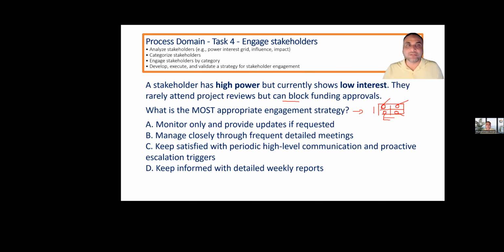A: Monitor only and provide updates if requested. B: Manage closely through frequent, detailed meetings. C: Keep satisfied with periodic high-level communication and proactive escalation triggers. D: Keep informed with detailed weekly reports. They don't have interest, so anything detailed will not work. When there are people like executive managers, they don't have time to read detailed reports. For that task, they have hired you.